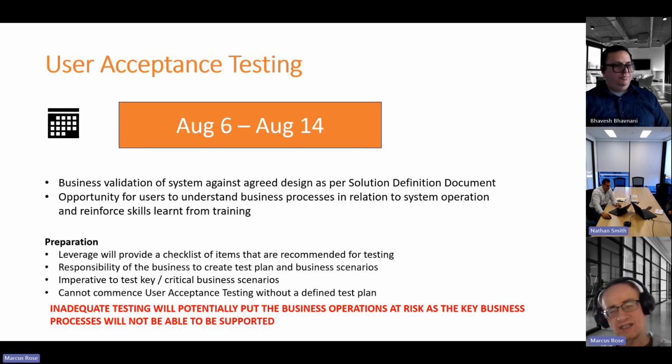So what you really need to do is convert those test checklists into scenarios, i.e., what are you actually going to test, real life scenarios, and to make sure that you cover off each of those items that's on our checklist. But it doesn't mean that you should only do one test per item.